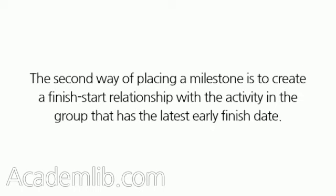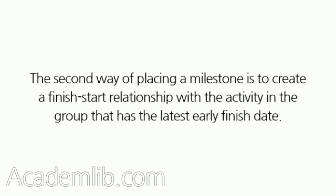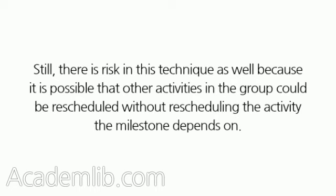The second way of placing a milestone is to create a finish-start relationship with the activity in the group that has the latest early finish date. In this way, the milestone will be rescheduled if this activity is rescheduled. Still, there is risk in this technique as well, because it is possible that other activities in the group could be rescheduled without rescheduling the activity the milestone depends on.